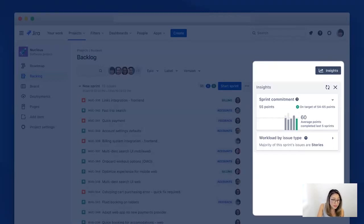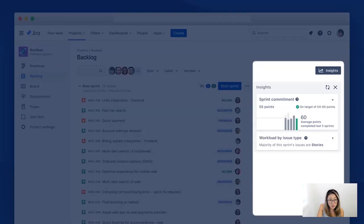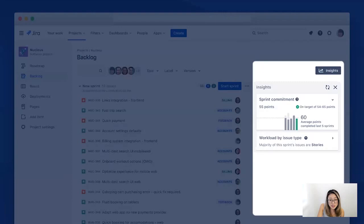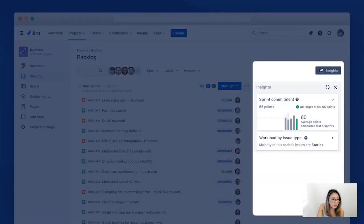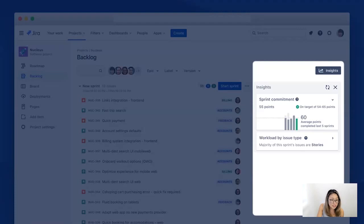This data is here to guide your team's discussion. So for example, maybe for the next sprint, some of your team members will be on leave or maybe it's going to be the holiday season. So your team will be at a lower capacity than usual. So in this case, your team can take this data as a reference and just discuss with your team what the new target should be based on your new capacity level. And over time, as you do this exercise with your team for every sprint, you'll find that these little moments of discussion can really help your team establish a more predictable and reliable velocity, which is what everyone wants, right?